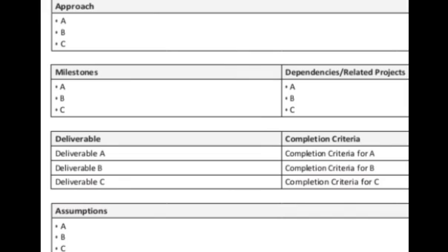The second milestone is going to start on the 8th of August down to what? 22nd of August. So that's your second milestone. Then you said the roofing is equally going to take 2 weeks. Let's say that 2 weeks now will start from 23rd to, let's say, 7th of September. You understand?